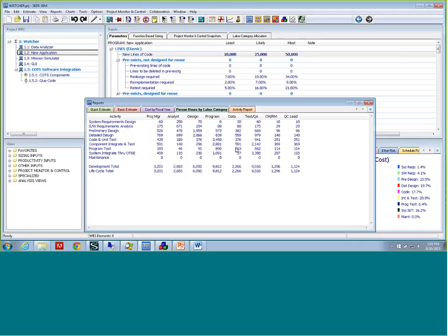Yeah, in fact, that was my question. So right now it is using some knowledge base by default. So if I have a project already executed under SEER and I have the real values in it, can we update as the project is going on, and at the end of the project we have the history created for that project? Yes, part of the life cycle, that's the ideal situation where you are able to create your SEER estimates, get that baseline, track against that estimate, and then collect the actuals, preferably at the activity level, so you have the hours, the estimate versus the actual.